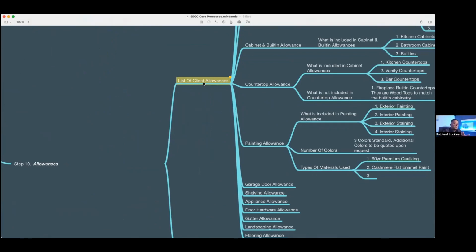But the curse can be if you don't ask the right questions and get the right expectations before you finalize a set of plans, and especially before you start building. When you start building and you go and install the kitchen faucet that's the Delta with the pull handle and it costs $300 or $400, the owner may have thought that they were going to get a fixture that's $2,000. But if you don't talk about that and just wait till you start construction, that's the problem with not making all of your selections during the initial design stage.